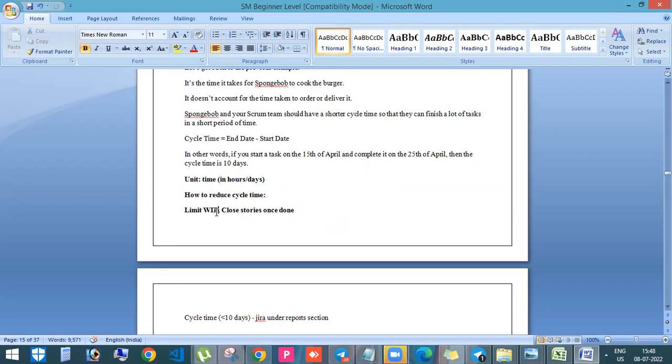So your team should have only limited number of work in progress items. This is one of the Kanban principles. In Kanban, they are having one principle where they're telling that team should have like less number of things in work in progress.